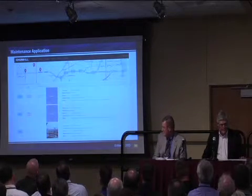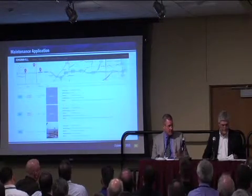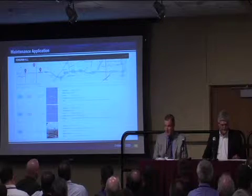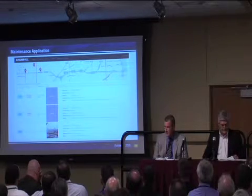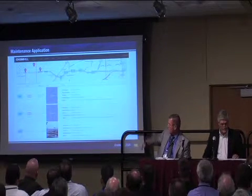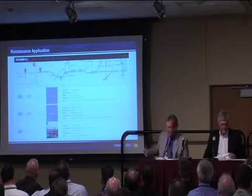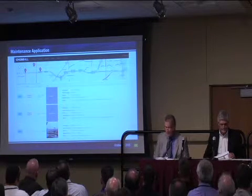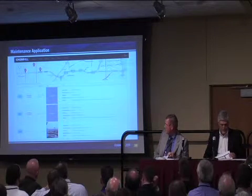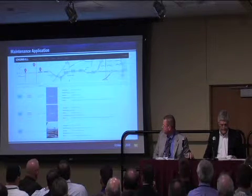One of the things that we use, and this is a shout out to CH2M Hill for developing this app, is our maintenance app. Robert and his team, TxDOT team, independent engineer team, folks back at the TxDOT district office have access to this app. When they see something that needs to be fixed, or if it's just general routine maintenance, they can go out, take a picture of it, and it logs it and keeps track of it, and you have the time that it needs to be fixed in order to keep from incurring any non-compliance points. Once it's fixed, it falls off the list and goes into the database. That's been extremely handy and useful for all of us, and it can be done from a computer, smartphone, or tablet in the field, so it makes it really easy to track the maintenance items.